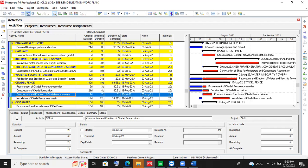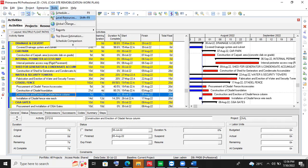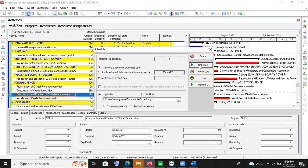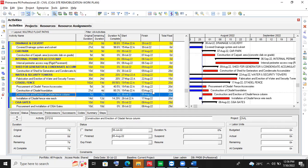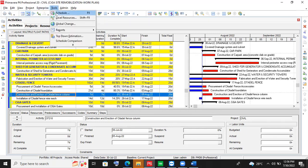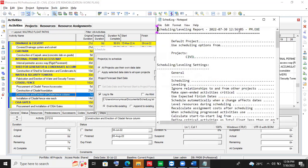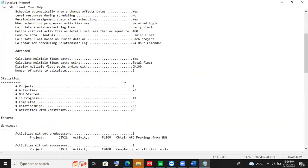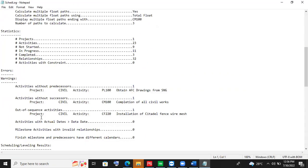And now it's not starting. So when you run your schedule, you schedule it, then go back and check the schedule log. Now you see — initially when we scheduled it, the out-of-sequence activity was showing zero. Now you see that we will have one out-of-sequence activity.